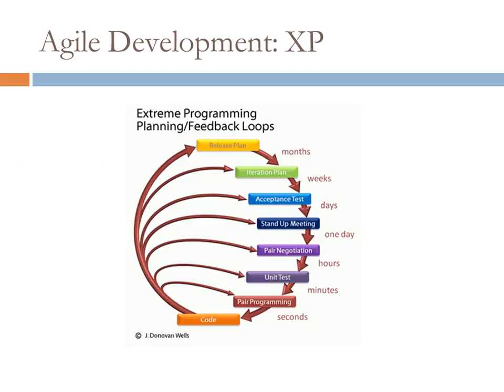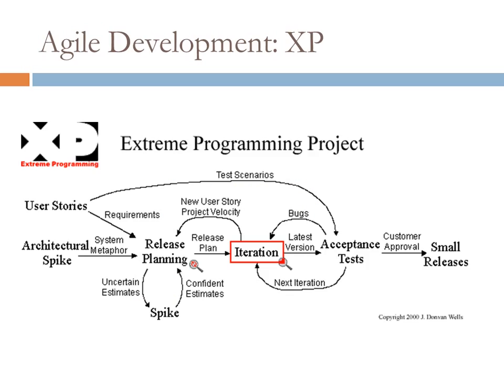Okay, so these acceptance tests are written and executed by the clients. It's separate from unit tests. Unit testing basically makes sure that the software itself actually executes the way it should. But that's separate from acceptance tests, which is, does the system as developed actually meet user needs? Does it do what the user actually needs it to do? So user involvement tends to be fairly heavy in this type of methodology.